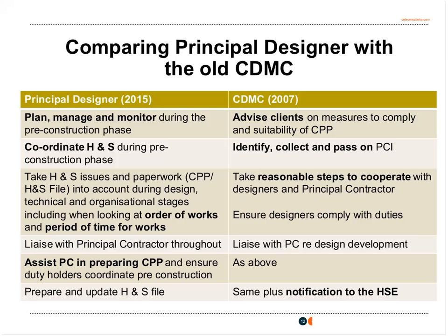They will be responsible for inputting on the timetable for works and also the order in which works are going to be carried out and the relevance of safety. And as always, they're going to have to make sure that the principal contractor has been involved and has all the necessary information they need to create their construction phase plan, and essentially for the baton to be handed over in terms of managing safety once the construction phase starts.